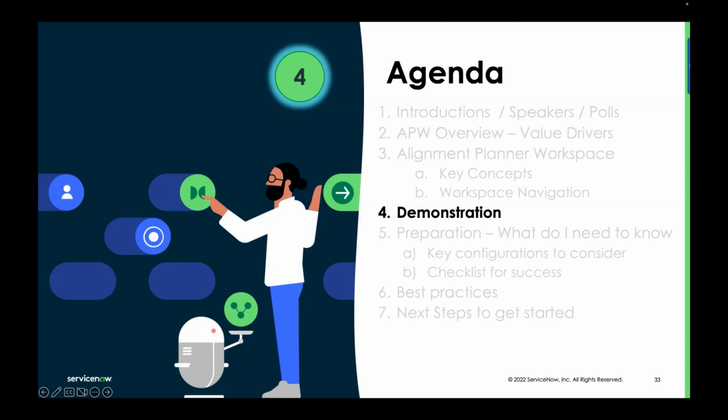You could also look, and as soon as you do that, you move into prioritization state. When you move to prioritization state to show up in the roadmap, when they're on a roadmap, you can start to look at dependencies between them. So you see them visually like a Gantt. You can start to see where they stop and end and where you've got conflicts and so forth. That might help you reprioritize things based on the schedule. Good. All right. Very good. Thanks, Scott.